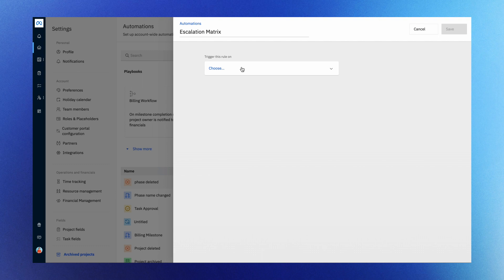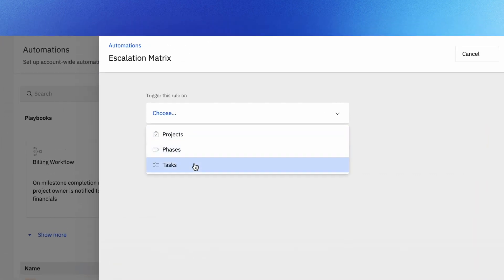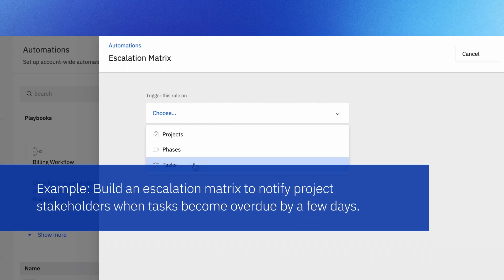Here you can choose a trigger type. This is what kickstarts your automation. Think of it like a switch that's flipped when certain events occur in your projects, phases, or tasks. For instance, say you want to build an escalation matrix to notify project stakeholders when tasks become overdue by a few days.